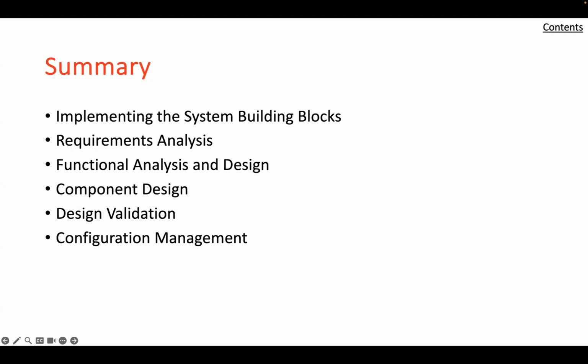Preliminary design has the objective to demonstrate that chosen designs conform to system performance and design requirements and can be produced within cost and schedule goals. The preliminary design review centers on major interfaces, risk areas, long lead items, and system level trade studies.